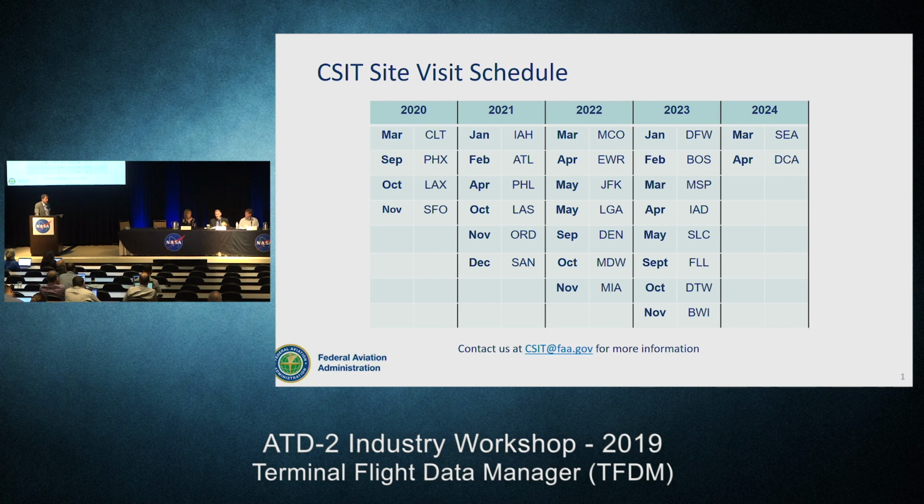There is an attempt to maximize the benefits of the program, to implement all the top 27 sites, all the sites where we're going to do metering, as early as possible in the waterfall. Those are all going to be done by the 2024 time frame. We still are deploying a significant number of sites after that, and it goes all the way out to almost 2029. So we've tried to maximize the benefit of getting the sites, but we have to not overload any one area and coordinate with other facilities to implement. I don't know if that answers the question.